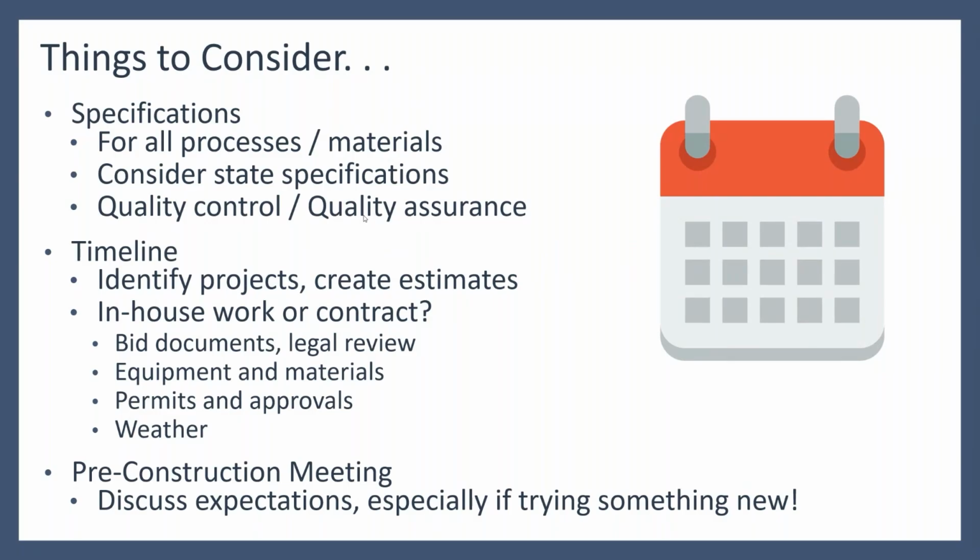Then we can start to think about the bids and the lettings and all of that kind of thing. How long is that timeline? During that timeline, it could be a year or more. Sometimes it's multiple years. What's happening to the condition of your pavement?